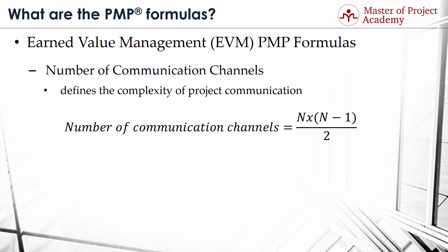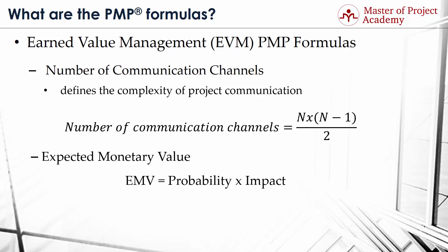PMP formula number 14: Expected Monetary Value or EMV. We usually use it in risk quantitative analysis to measure EMV of an opportunity or threat. We calculate it by the following formula: EMV equals probability multiplied by impact.